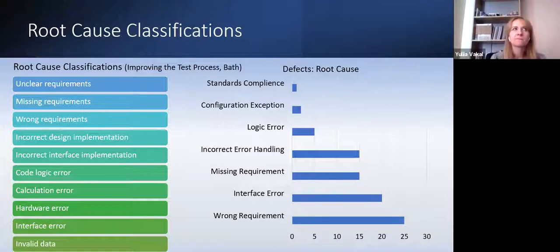I would highlight again: if you find a root cause and you can't fix it, even if you conduct it during your retrospective, and it's something you can't do within the team or within the organization, that's not the root cause. You need to find something related to processes, policies, or, I would say, training. I don't want to talk about people, but most often it's processes and policies, I would say.